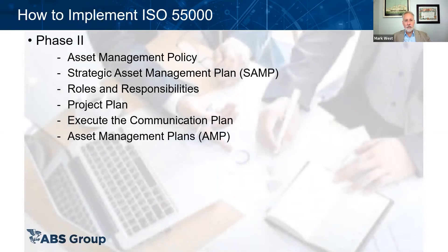In phase two, we get our asset management policy in place, our strategic asset management plan, and the roles and responsibilities. Roles and responsibilities are extremely important — it's not just so each person knows what they're supposed to do, but to make certain everything that needs to be done has an owner. It's very easy for gaps to form without good role and responsibility charts. Then we create a project plan, execute the communication plan, and start developing asset management plans according to the criticality of our assets.